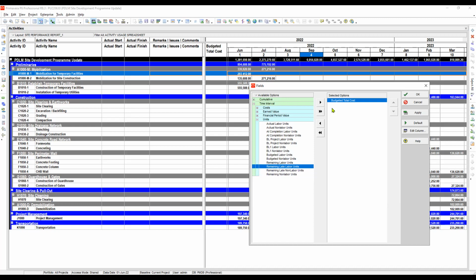Let's say, for example, we can have a resource of materials, where the units are in square meter, while for the resource for the manpower, the units being used are man day or man hour. So they are not the same. So that is why when it comes to units, we should be specific to the type of resource.